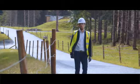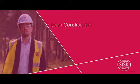Another major challenge we have is in relation to management resources and managing materials, and this is where lean construction comes in. We utilise three main techniques here, which is work sampling, just-in-time delivery and kitting.